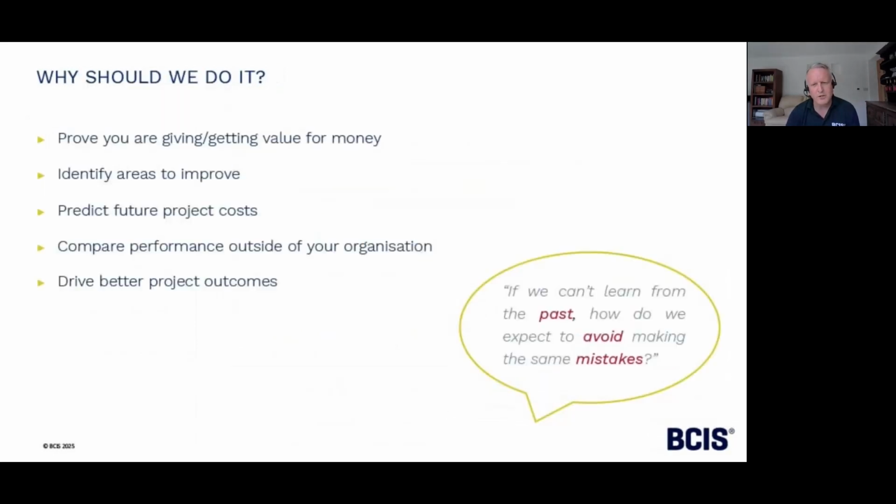So why should we do it? Well, there are a number of different reasons why we should do benchmarking, and it does depend on who you are and where you are in the supply chain. Some of the common ones we're familiar with is the stakeholder benchmark report, which is really designed to show that a client funder is getting value for money, how their project at the moment is comparing against others. We also like to see project teams using benchmarking as a way of identifying areas to improve, to support value engineering activities and other things.